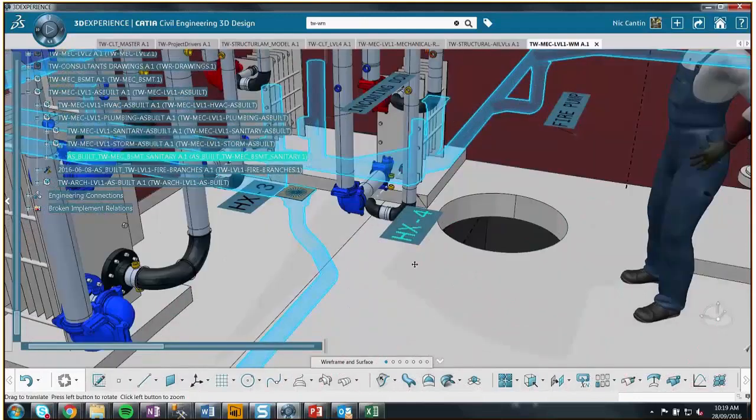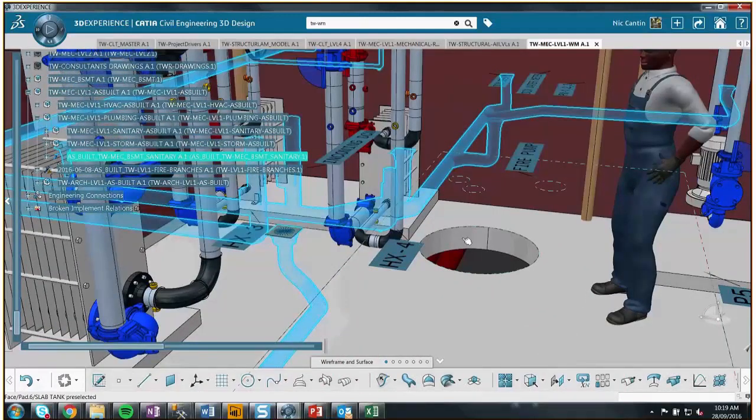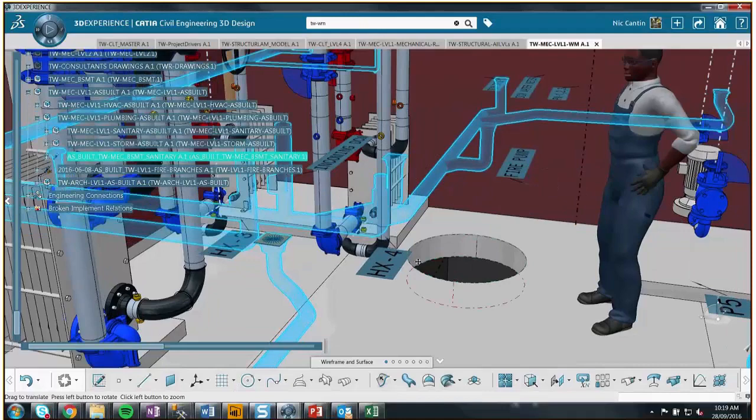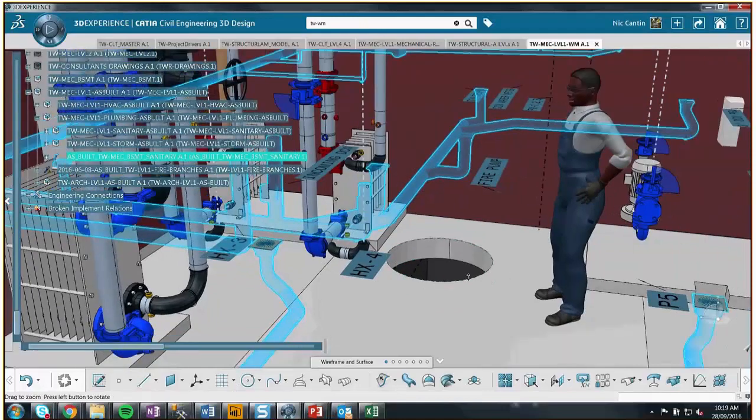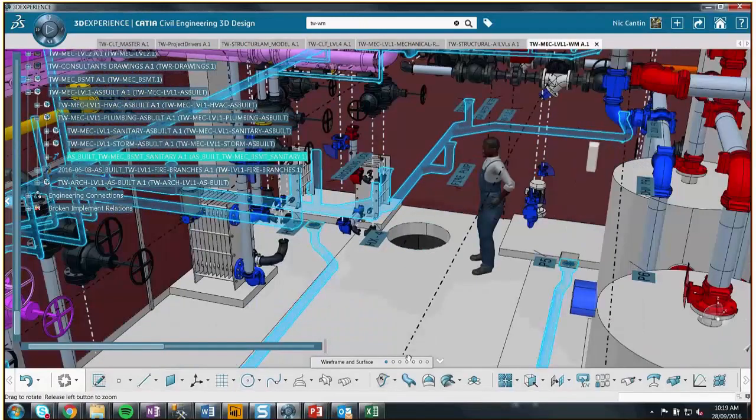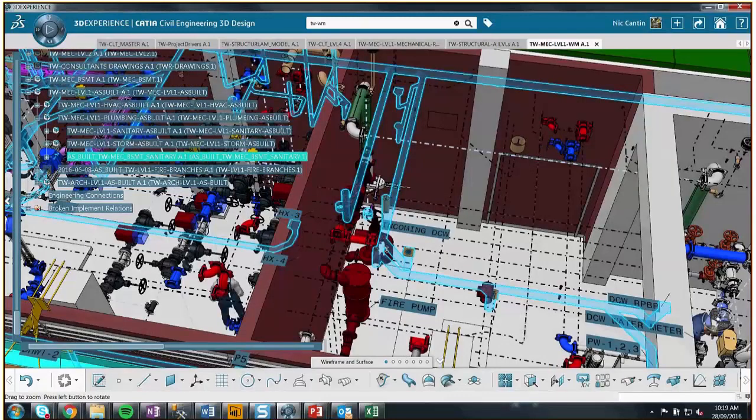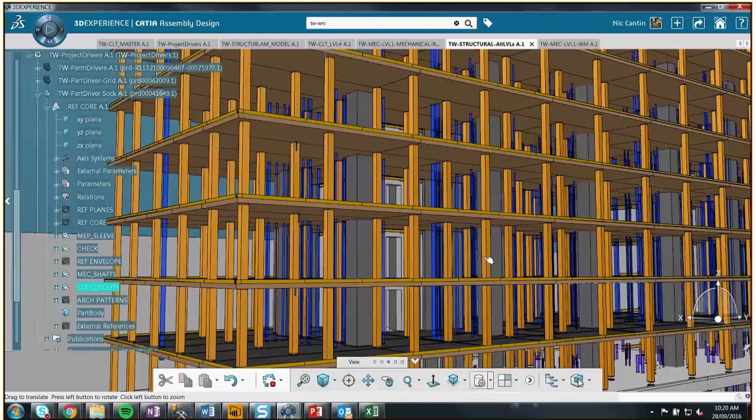I know for your guys it's a different workflow, but in this project for Tallwood, let me see if it opens. Where's the all levels? Here it is. So the angles on the core. The big risks were concrete to wood elements. Everything with that prefab wood was connecting to concrete, and obviously cores aren't perfectly vertical as you go up. So this is going to be heavy.